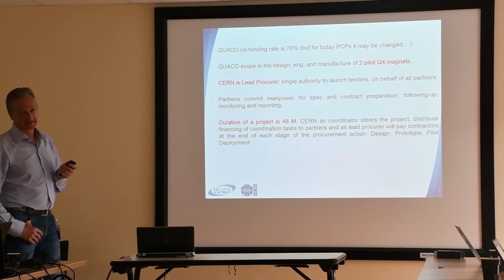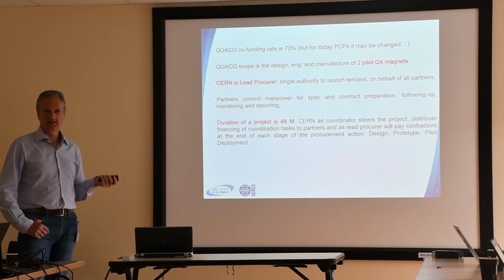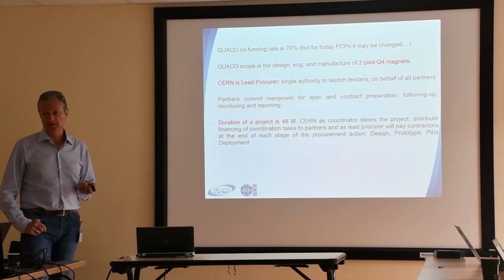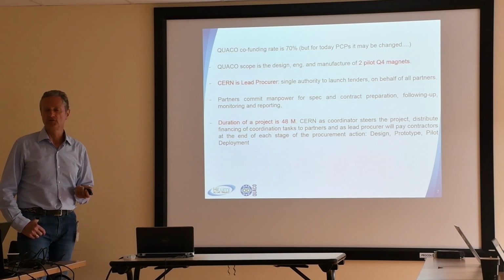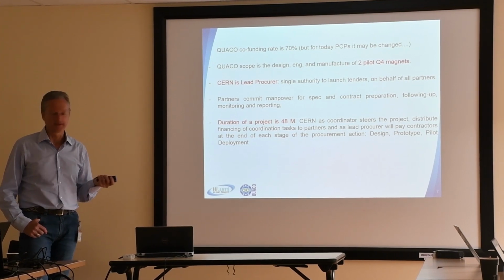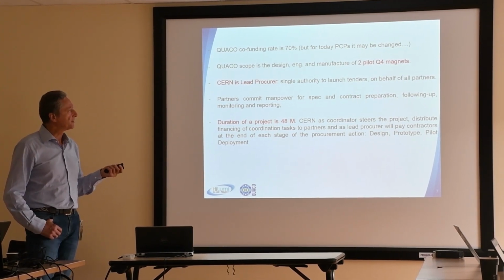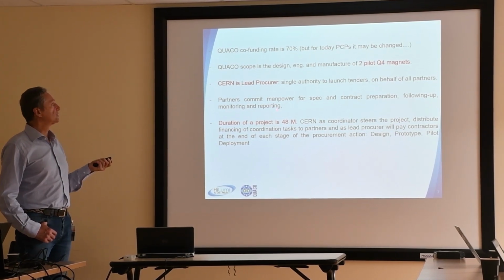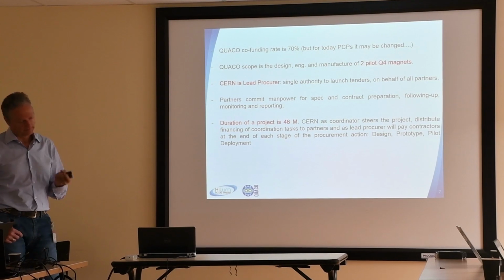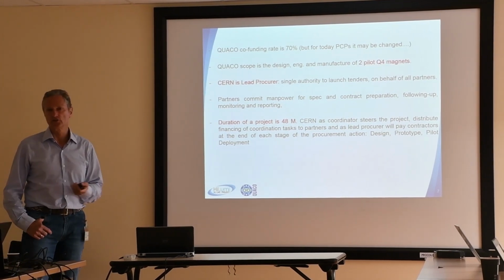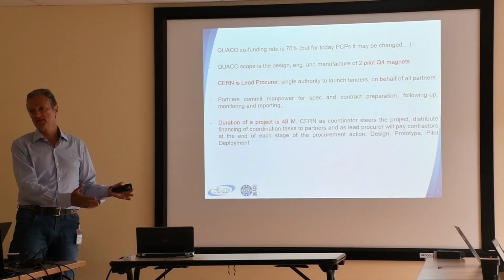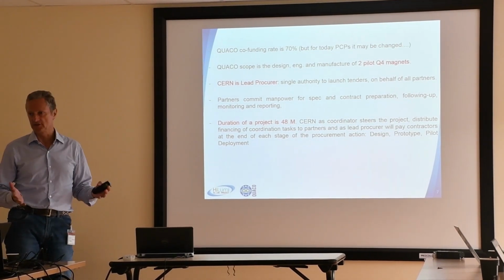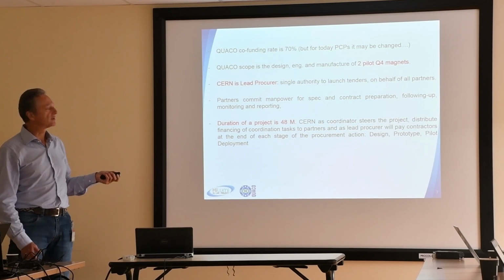What they do, the partners, the laboratory, they have to commit manpower for preparing the specification, as I was saying before, at the level of functional detail. They have to prepare the contract preparation, they have to follow up, they have to monitor and report, and they will add as well, as we are doing something that industry still is not able or willing, or both things, to do. We have to do also technology transfer.